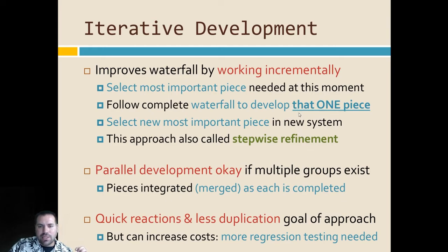Here we're going through the entire waterfall, each step of the development process, but we're usually only developing one piece of the software instead of a full prototype that's supposed to be fully functioning software. Oh, that's one of the downsides of rapid prototyping. Usually a lot of features are broken. I kind of mentioned that, but I want to make that explicit. Here the features aren't broken, but you're developing one piece at a time and just slowly developing the whole project.